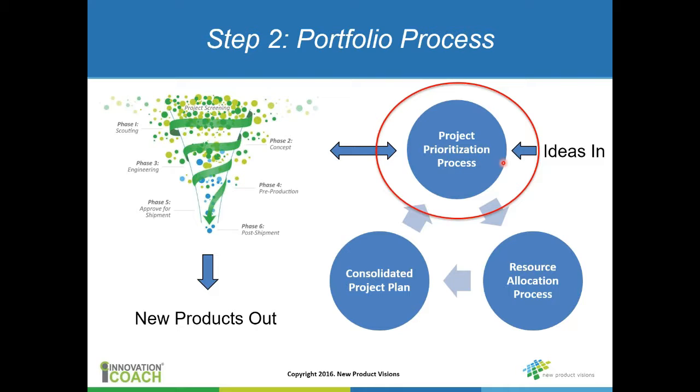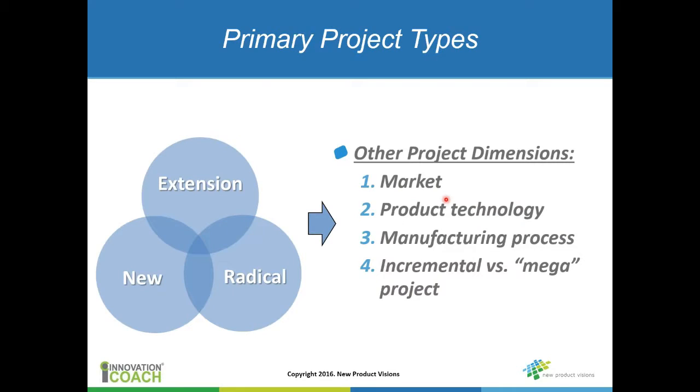The other two buckets being the projects that you've got currently that you're working on, as well as the group of projects that you might have decided to work on, but you're waiting on ideas. So the idea now is to line up those three buckets and prioritize them from 1 through X. So this is a raw prioritization from 1 to X.